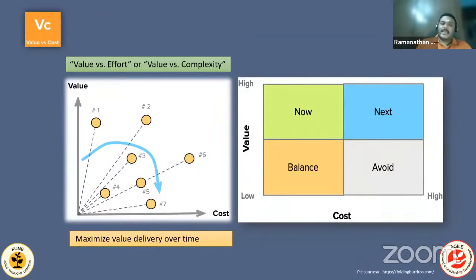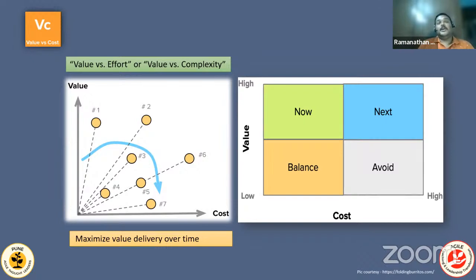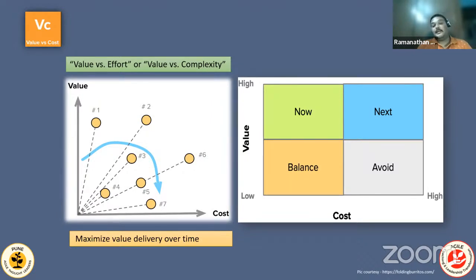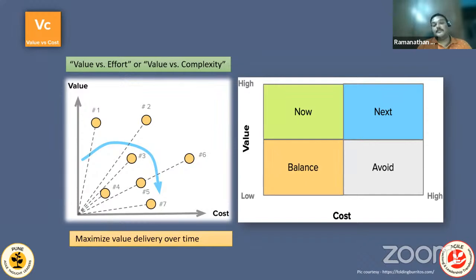Value versus Cost — also inspired by Mike Cohn — can also be called value versus effort or value versus complexity. The goal is to maximize value delivery over time. On the quadrant: high value and low cost — do it now; high value and high cost — do it next; low value — balance or avoid. This helps hold certain priority items and plan the product roadmap accordingly.